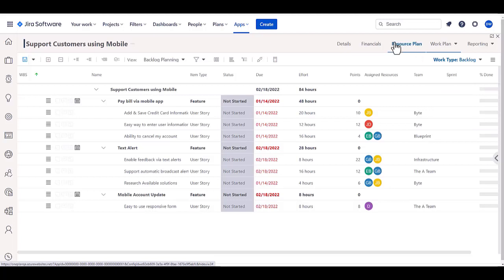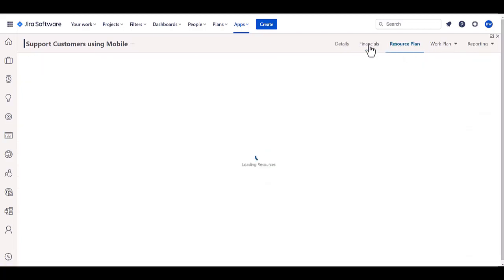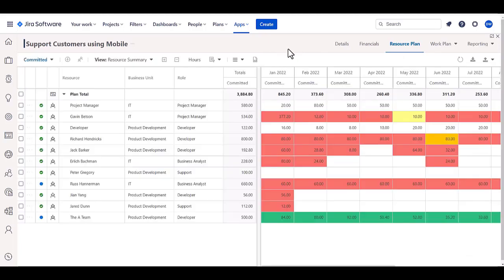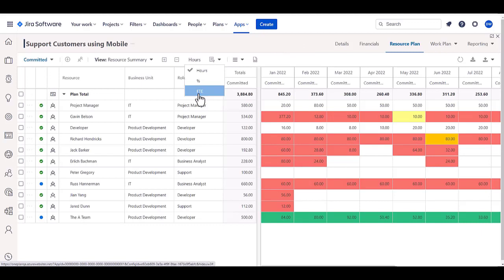We can even do resource planning. It allows us to do resource planning in a flexible set of ways. You can plan in terms of hours, or you can plan in full-time equivalents or percentages of allocation.